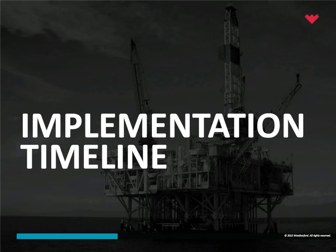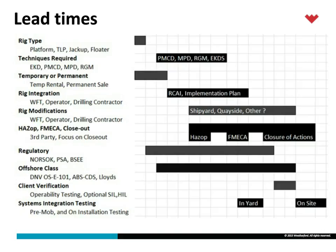For well rentals in the projects I've historically been involved with, it's taken anywhere from 6 to 12 months to prepare rigs for a well or for multiple wells — to do temporary or semi-permanent or permanent pipework installations, all the rig interfacing, EX registers, fire and gas, equipment layouts, rig training, familiarization, and testing of equipment. This has taken 6 to 12 months regardless of whether it's been a jackup or a platform. I haven't been involved with a TLP, but I assume it's very similar.